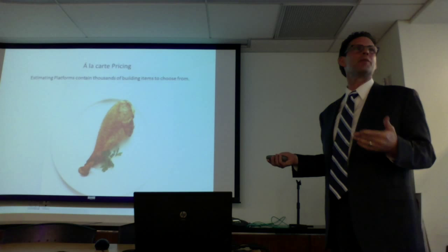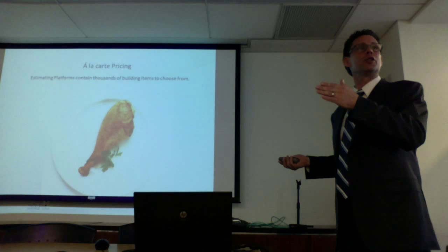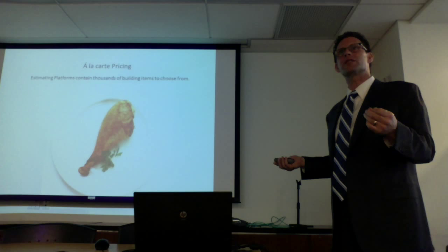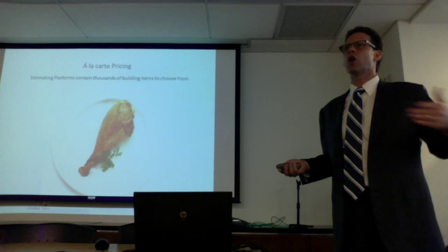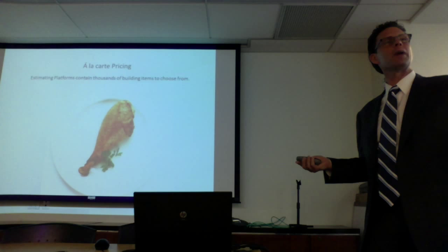The number itself is not factored for Sandy or post-Sandy, and the line items aren't included. So if you're talking to an estimator or a reviewer, and you see a line item that says boiler, you can say, what about the zone valves? There were four zones in this house. What about the piping that was submerged under salt water? What about the circulating pump, etc.?